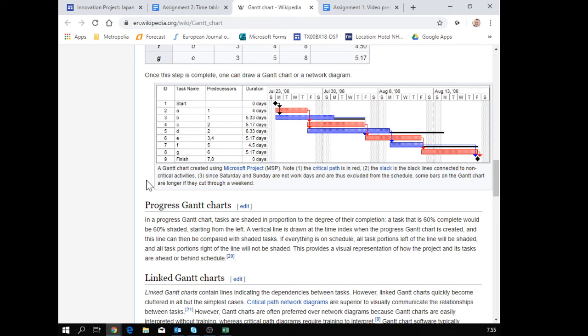And for documenting, you can make subtasks called report. You need to do also the poster. You need to do the video demonstration. So maybe after the usage test you would have the video. The report you would do somewhere here, maybe the poster somewhere here, maybe tweak your video. But anyway, that's just an example of how to make the Gantt chart.